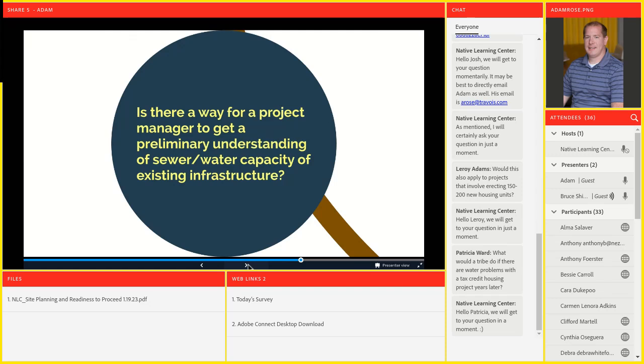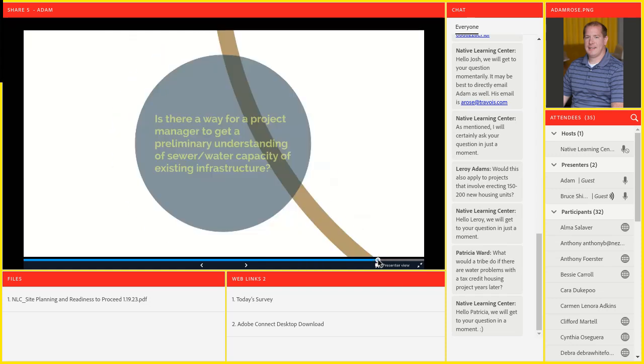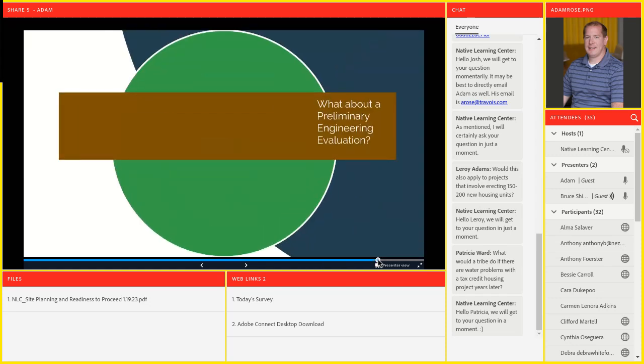In California, those studies are required when you submit a development application. So engineers typically do that in the early stages of a development, looking at sewer and water capacity and storm drain as well. And when you talk with your mechanical, electrical, and plumbing engineer, you'll have them do the same thing for electrical, to make sure that whatever infrastructure is in the vicinity could handle the additional power demands of your project.